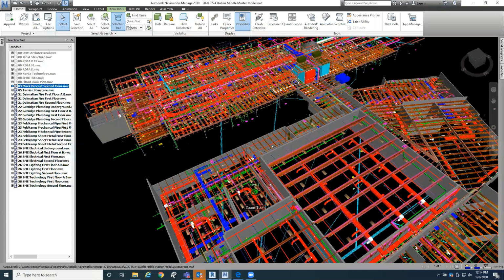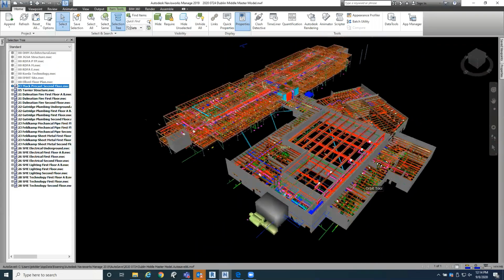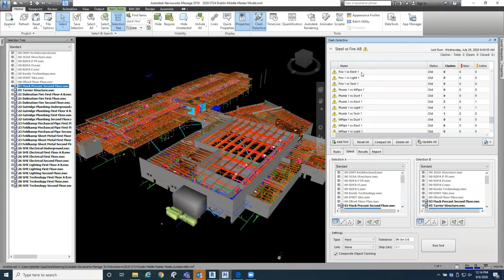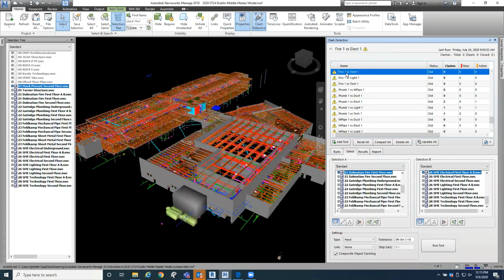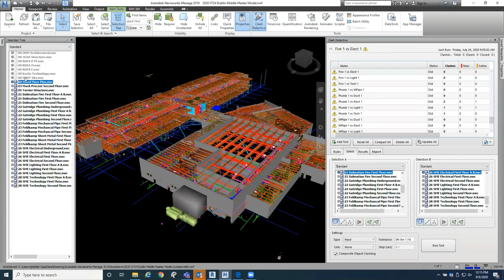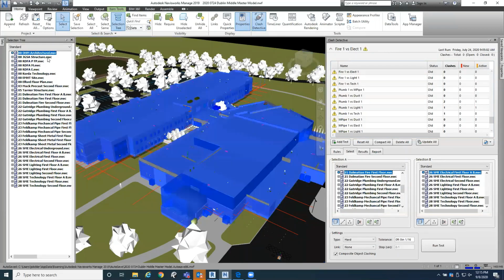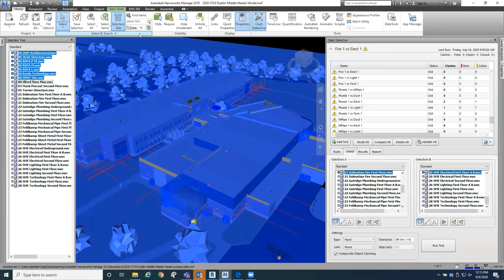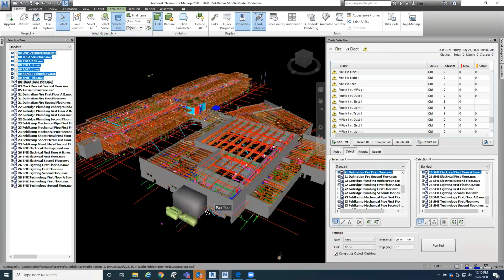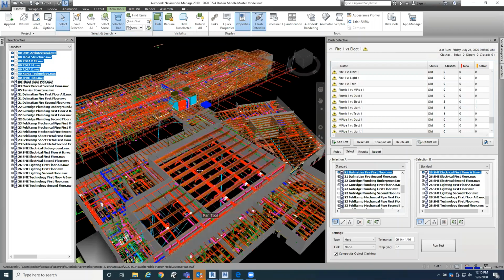so this gets me down to where we start to do our clash detection, and then I'll simply go through and start. I don't clash detect against the design team model. So design team model is here, but I'm not clashing against it. All I'm clashing against is what our contractors give us as their scope.